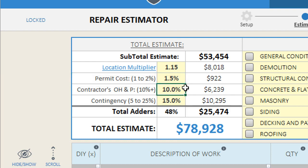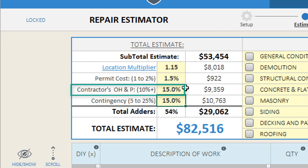The costs inside the repair cost estimator assume that you'll be hiring and managing and subcontracting the work yourself. So if you're going to be an investor that is hiring a general contractor to manage your project, you need to include costs to pay for the contractor's overhead and profit. General contractors generally charge 10 to 15 percent of the project value to manage the project, so simply plug in your percentage and the spreadsheet will calculate the general contractor's fee.